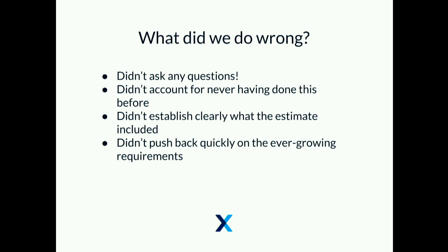So what did we do wrong? First of all, we didn't ask seemingly any questions. The client said we bought this thing, we need to add it to the site, and we said yeah, sure, it's probably easy. We didn't account for never having done this before — ReadSpeaker was new to us. We were completely unaware of what might go wrong. We should have assumed it wasn't going to be just a case of adding the module.